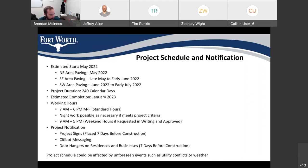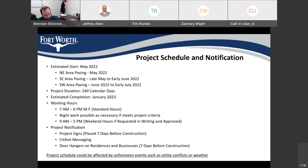For project notifications, 7 days before construction there'll be project signs placed in the field and city bot messaging boards placed out there as well so people can scan and opt into city bot. We'll also be placing door hangers on residences and businesses 7 days before the start of construction. The schedule could be affected by any unforeseen events such as utility conflicts or weather.